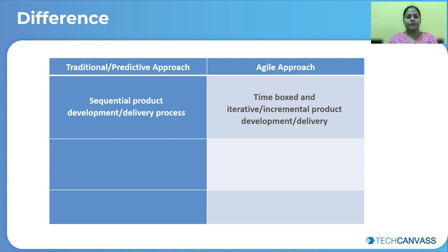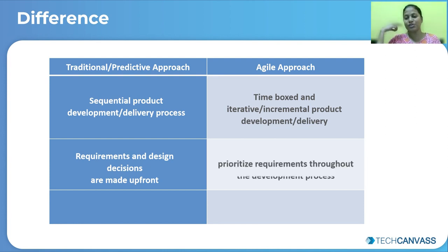Second, in the case of traditional, you have to do a lot of work on requirement gathering and planning, which needs to be done upfront. But in the case of agile, since you're constantly getting time to inspect, adapt, and also get feedback from the stakeholders, from the customer, from the user, you always have an opportunity to negotiate or reprioritize the requirements.